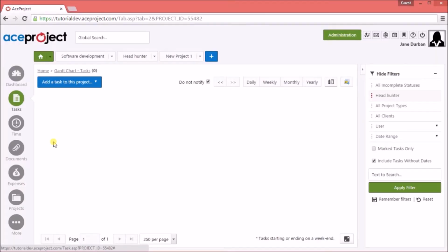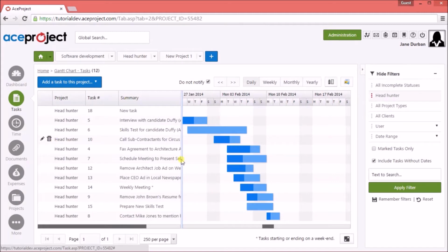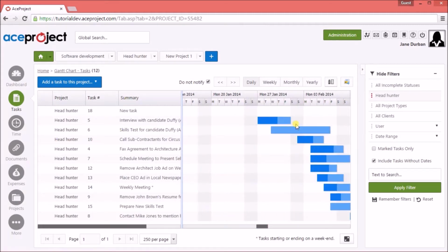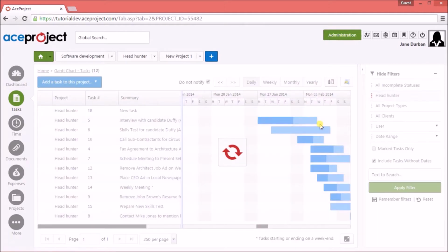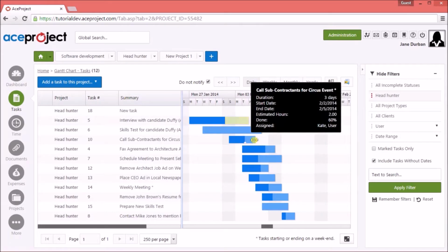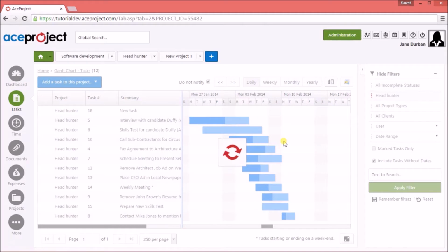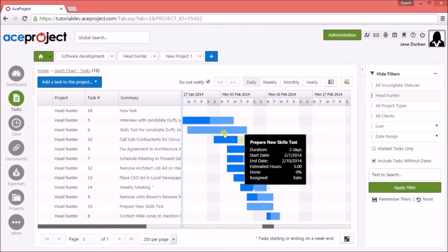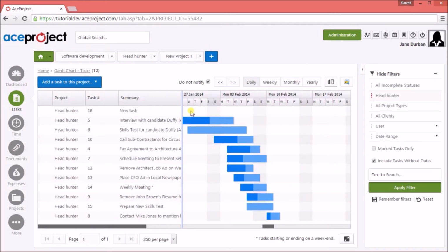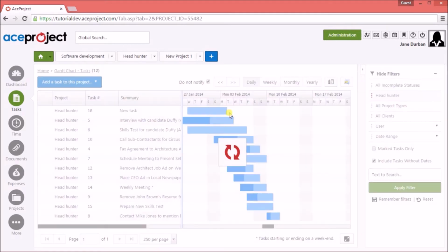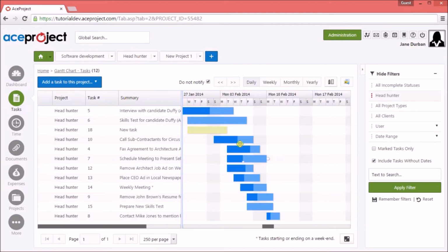The Gantt is now interactive, meaning you are now able to modify the estimated start and end date visually. By default, changing the dates will automatically reorder the list in order of start date. If you create new tasks and do not set an estimated start or end date, the task is available in the list. Simply click and drag to set the new dates in the chart. So, if you started a project, create all tasks, and then you can visually manage them from the Gantt chart.